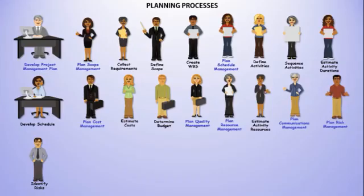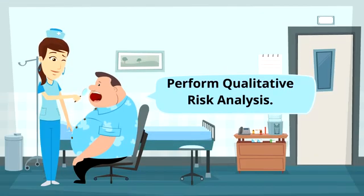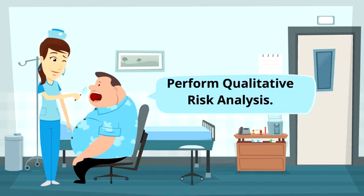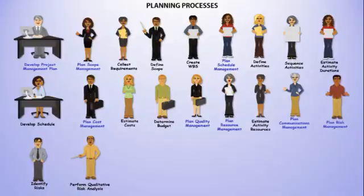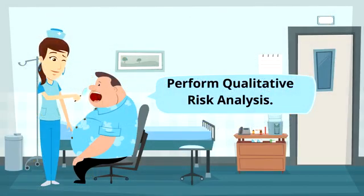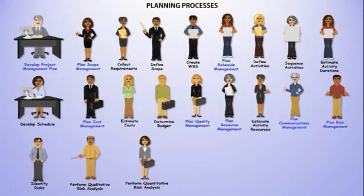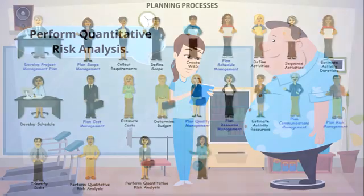The next process is Identify Risks, where any risks — positive or negative — are identified. The next process is Perform Qualitative Risk Analysis, where the team analyzes risks from a qualitative standpoint. Think of this as a multiplication of a probability rating and an impact rating — probability times impact gives a risk score, hence a qualitative analysis. The next process is Perform Quantitative Risk Analysis, where the team analyzes risks from a monetary standpoint, a resource hours standpoint, or some other quantitative measure.